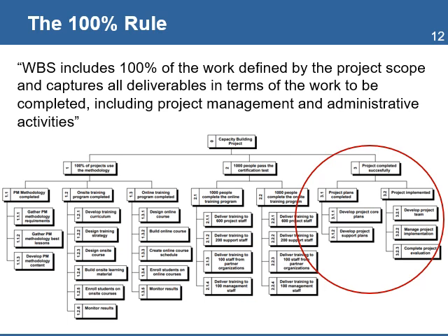That means that the WBS will include all other work not described in the logframe, such as project team meetings and trainings, participation in seminars, presentations, administrative activities, setting up the project office structure, the purchase of project equipment, and including the development of our project management information systems. All the activities that will use project resources need to be included in the WBS.